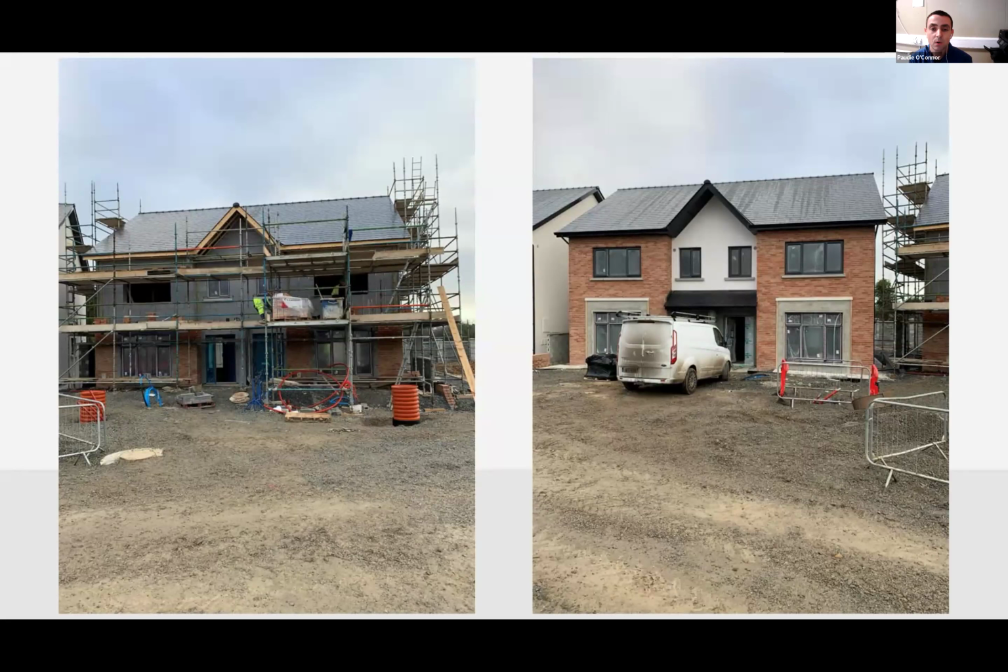So typically you build a story at a time. So they had timber floors in this and joists. So what we do is we start off, you do your dead work, you pour up your DPC level, then you come back and we do to just above joist level.